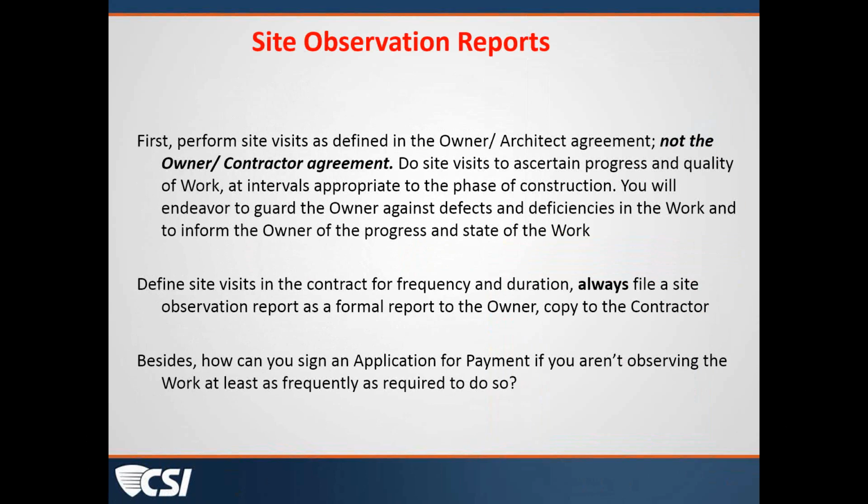They should be there. Yeah, and there was a comment that came in right as we were switching from the last case study to this one that I think ties into this conversation as well, about how standard trade practices affect a contractor's standard of care. They should question design requirements that potentially conflict, and that relates to what contractors should do when they notice odd or wrong design requirements. They can't just blindly build what's designed or rely on the Spearin doctrine. I think that also points to this as well. If that meeting happens at the beginning, chances are there's less of that confusion down the road. That's a good point.